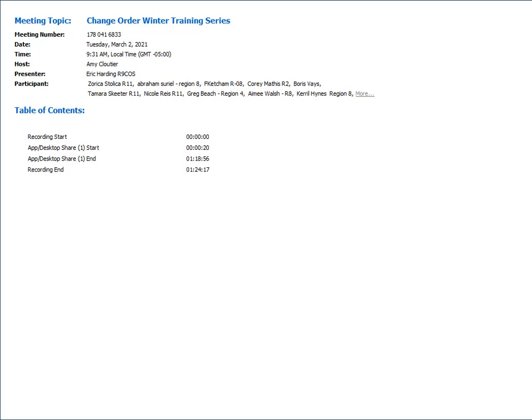Yeah, it's only for the hours they show up on the daily, Mark 31. And if they don't show up on the certified payroll, I believe you can request, if it's after the fact, they're on the payroll, everybody agrees, yeah, this guy was here. You can request an amended payroll, is that correct? Yes. But again, we have to have proof that they were on site somewhere.